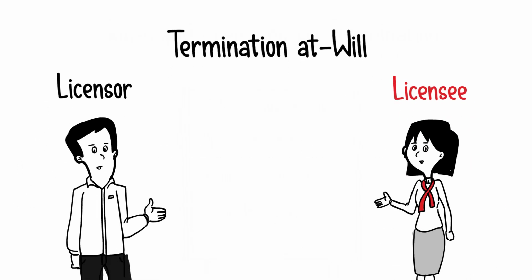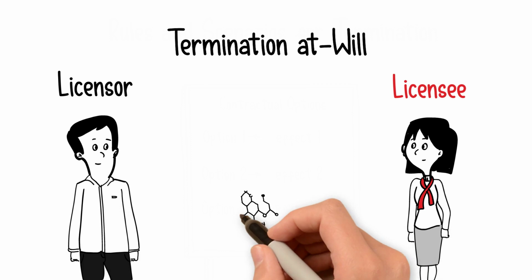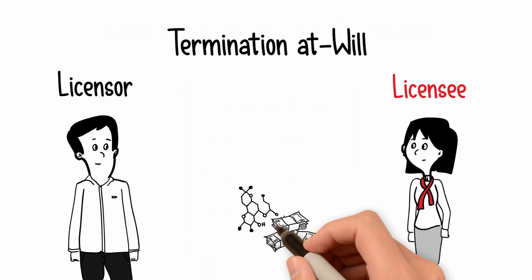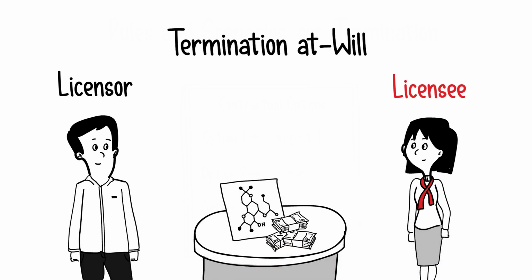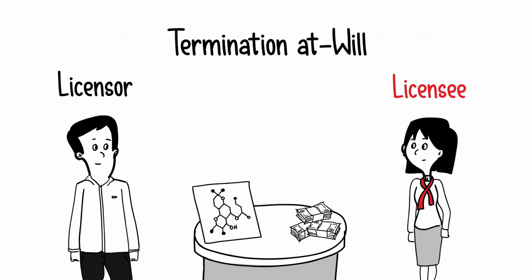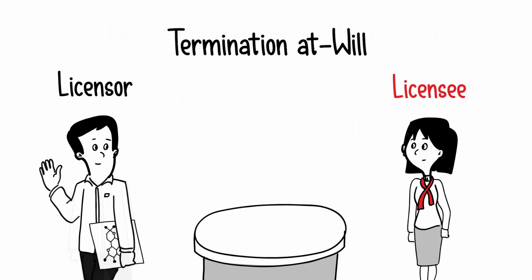Termination at will. Keeping an unwilling partner provides no benefit. At-will termination prevents unmotivated partners, lukewarm contract execution, and missed alternative opportunities. Potential financial penalties and intellectual property or license transfer in case of an at-will termination should be negotiated and defined in the agreement. Ideally, rules to calculate cost of at-will termination should be defined in the agreement to reduce economic uncertainty and make at-will termination more acceptable.